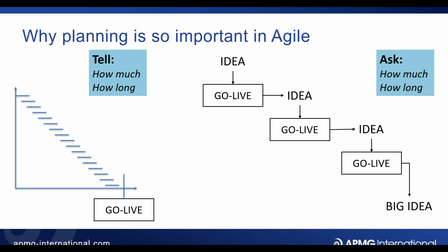So I think you can always take whatever the big idea is, and you can sort of say, do you know what, we can work out, let's focus on just grouping this work together that's got some similarity. And actually, if, by the way, we were then told halfway through our planning that this can't be a 4-day event, it can only be a 3-day event, we're going, well, that's okay. We've done the strategy piece, we've done the new product development schedule, and we've done the third piece, which is everybody's had an involvement in what our location plan should be, because we want to expand internationally. But what we're not going to get to is what we think our new leadership development program should look like, because we've lost a day of our event.